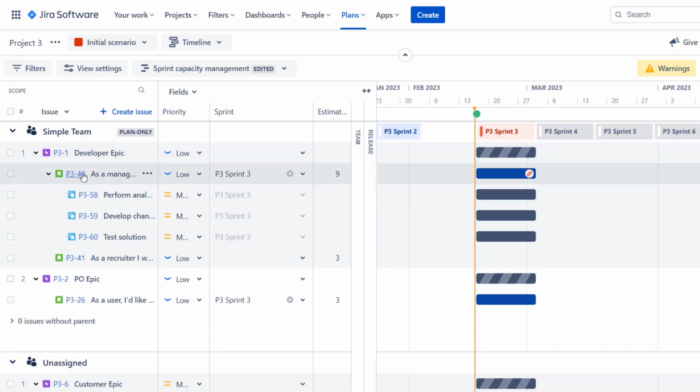Subtasks are just subtasks of this particular issue, this particular story, and this story is linked with epic link to this epic. That way we indicate hierarchy in Jira, and this is how Advanced Roadmaps understands where in the hierarchy each issue should be placed. But this standard Jira hierarchy is kind of limited. We can only have 3 levels of issues over here, right? So for a lot of you, this will not be sufficient.